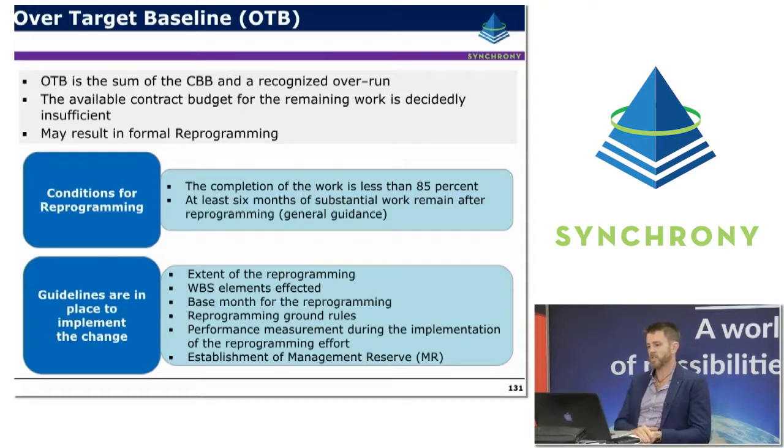So the typical conditions that apply would be that the project completion work is less than 85% complete. So if the project was so close to being complete, you might say it's really not worth having this formal reprogramming process. And you'd think that at least 6 months of substantial work remain after the reprogramming, so that you're actually going to get the benefit of that formal reprogramming.